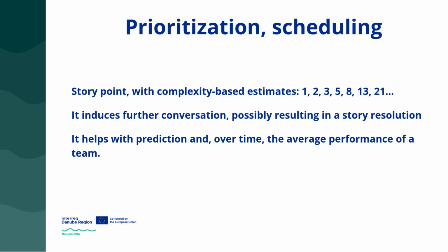It is a well-established method for determining, across 2-week iterations, measurable indicators that show how many story points worth of work the team can complete within a given time frame. If we imagine that our story cards have been estimated for their level of complexity, then this provides a certain degree of predictability regarding when all the cards or user stories on the story map will be completed, which, ultimately, is always the most important question for the client. When will they get what they really want? In reality, this method can provide a fairly accurate estimate.